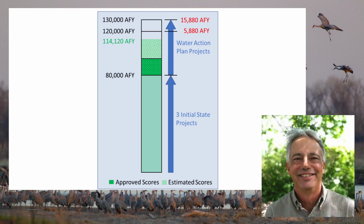We had projects conceptually that would get us there. We found out a lot of these engineering projects are pretty darn expensive. Cost estimates on the second round of design, when we went from reconnaissance level to preliminary design, doubled. We ended up having features in the dam we didn't think we would have, like membrane liners and some other things.